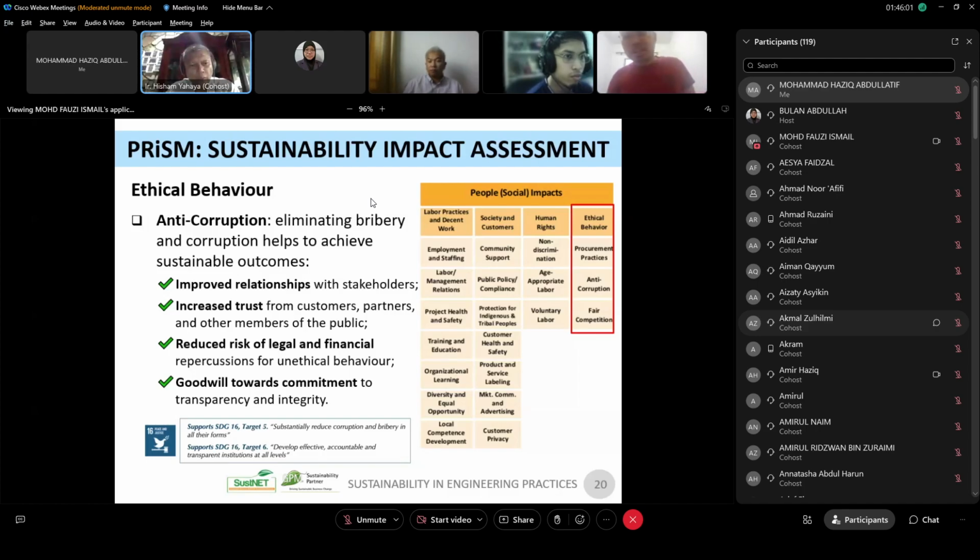It's the same with manpower. If you take out a lot of the costing for corruption, then you cannot engage skillful people, because skillful people you sometimes pay, say, 200 ringgit a day, but because you've taken out the money, you can only afford to pay something like 120 ringgit. With 120 ringgit, you are not getting highly skillful people, you're getting less skillful people, and they will produce a less quality or poor quality outcome. At the end of the day, sometimes you see a building just completed, then you can see cracks, you can see it's not been done properly, and so on.